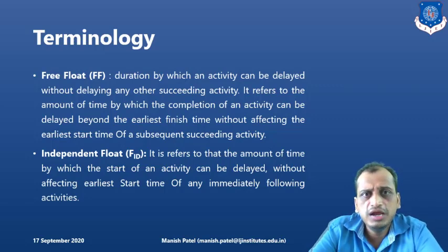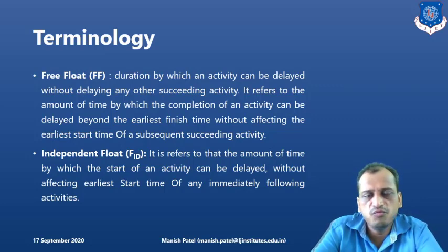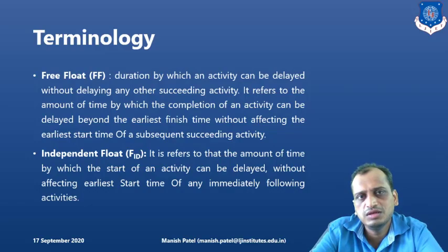What is independent float? Independent float is again the duration by which we can delay the activity, the predecessor activity, without affecting the earliest start time of the succeeding activity.